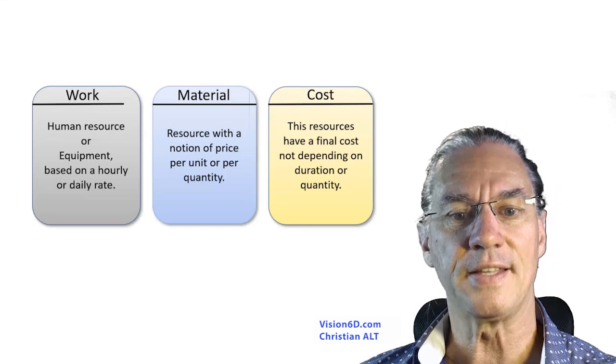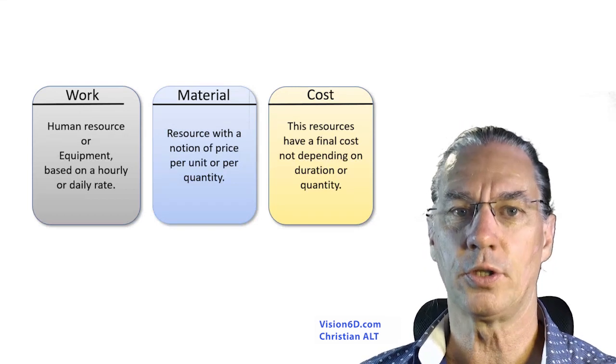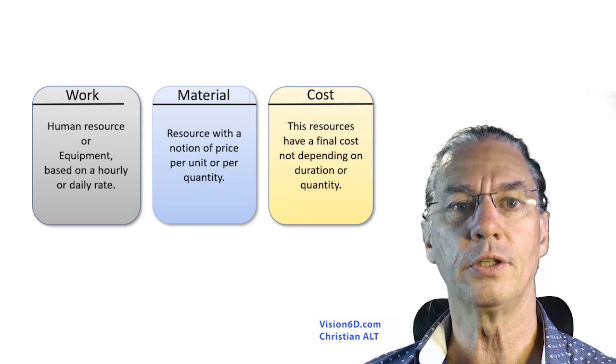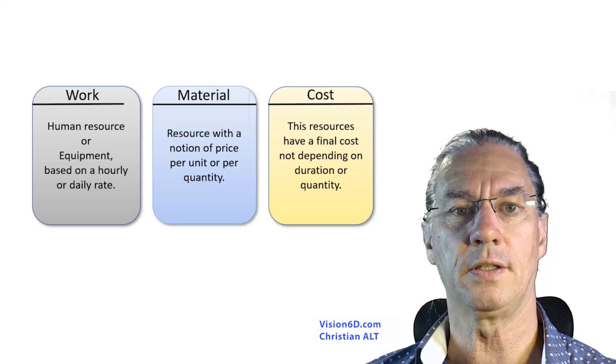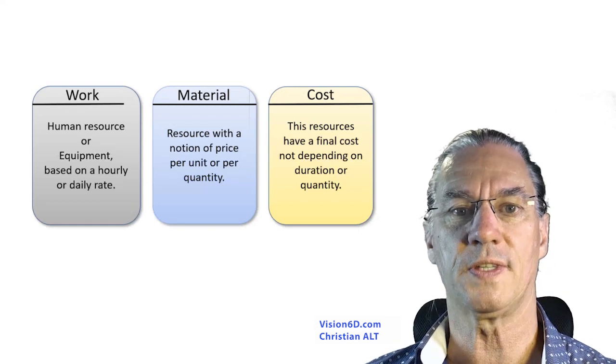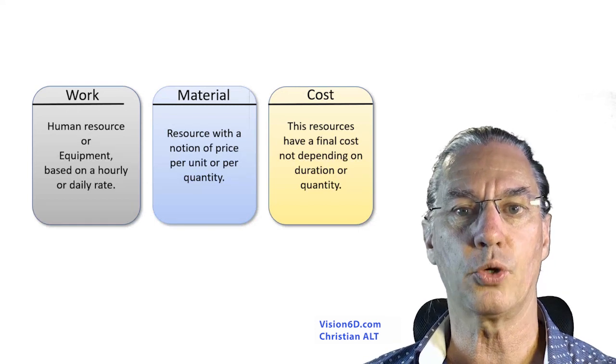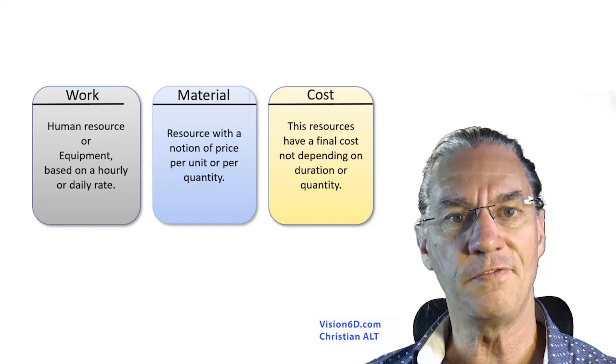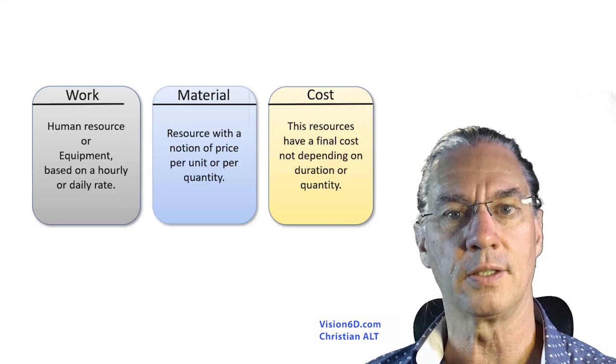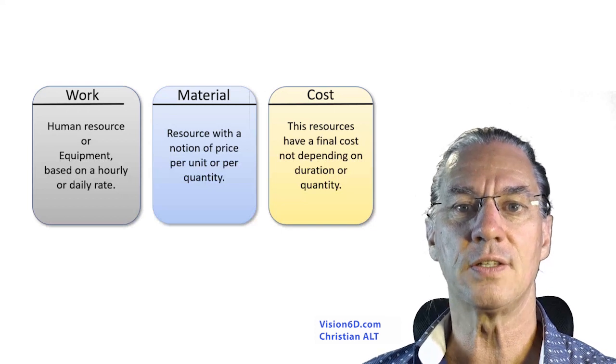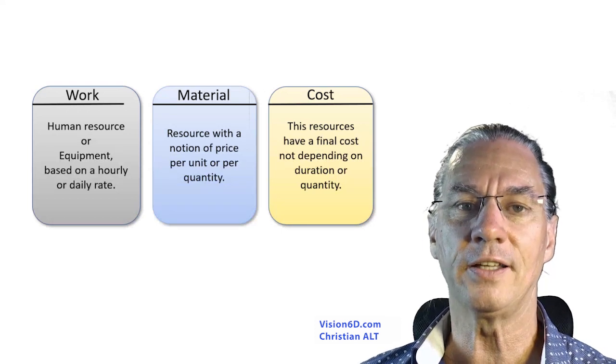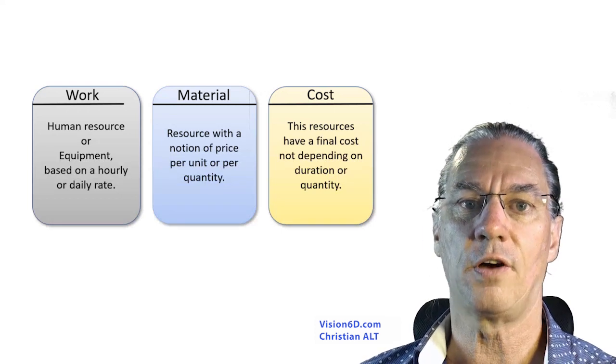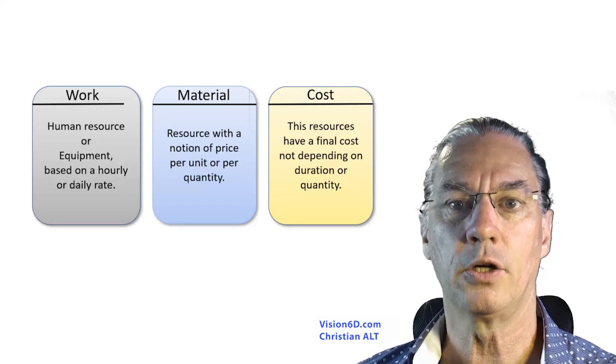In that sense it's not a resource of work nor is it a resource that we pay per quantity. It's really a flat rate. For this we have that kind of resource which is of type cost.